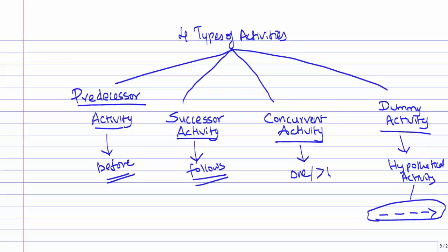Scenario 1 can be to make activities with a common starting and finishing point more distinguishable. So you would take effort to make the starting and finishing points distinguishable, and in those scenarios you can have this dummy activity. Scenario 2 can be to identify and maintain proper precedence relationships between activities that are not connected by events. Okay, so it is basically to create precedence.